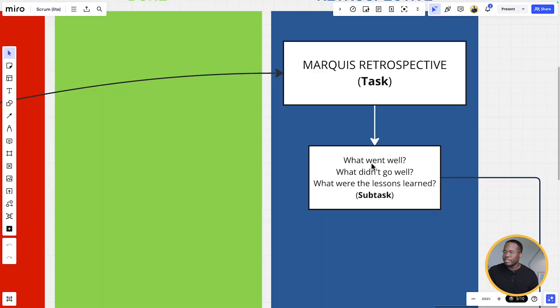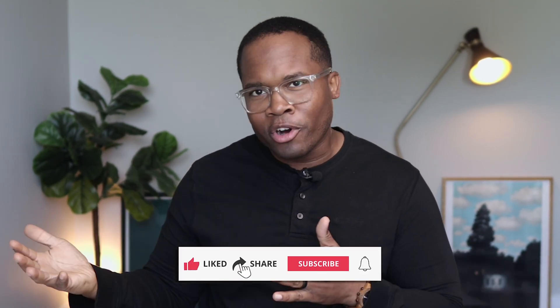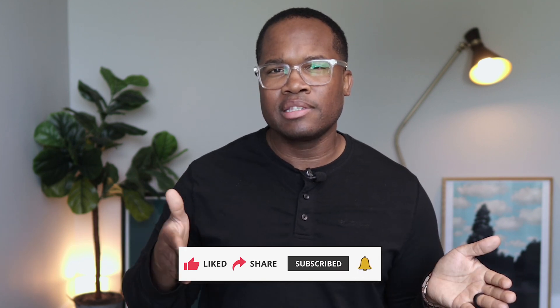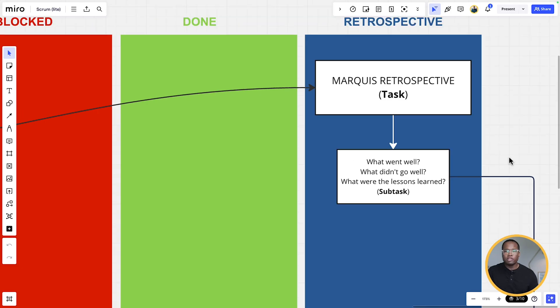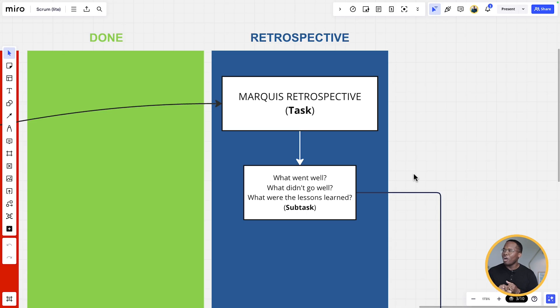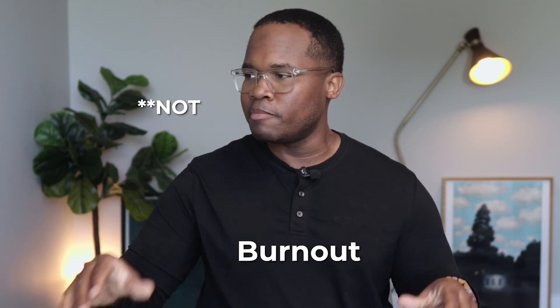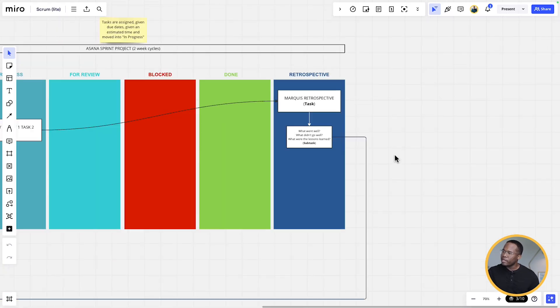Once they're done, each team member will have a retrospective card or task within the master sprint board. Within that, we have subtasks that get them to answer what went well, what didn't go well, and what were the lessons learned. I've assigned the two-week sprints for the remainder of the year — six months left, two quarters — we've got 13 of these subtasks with defined dates. We're not having daily stand-ups because nobody needs more meetings. We are doing virtual retrospectives where every team member is required at the end of the sprint cycle to do their retro, update their subtasks, and plan for the next sprint. We're cutting back on meetings to help remote teams be more efficient and eliminate burnout.